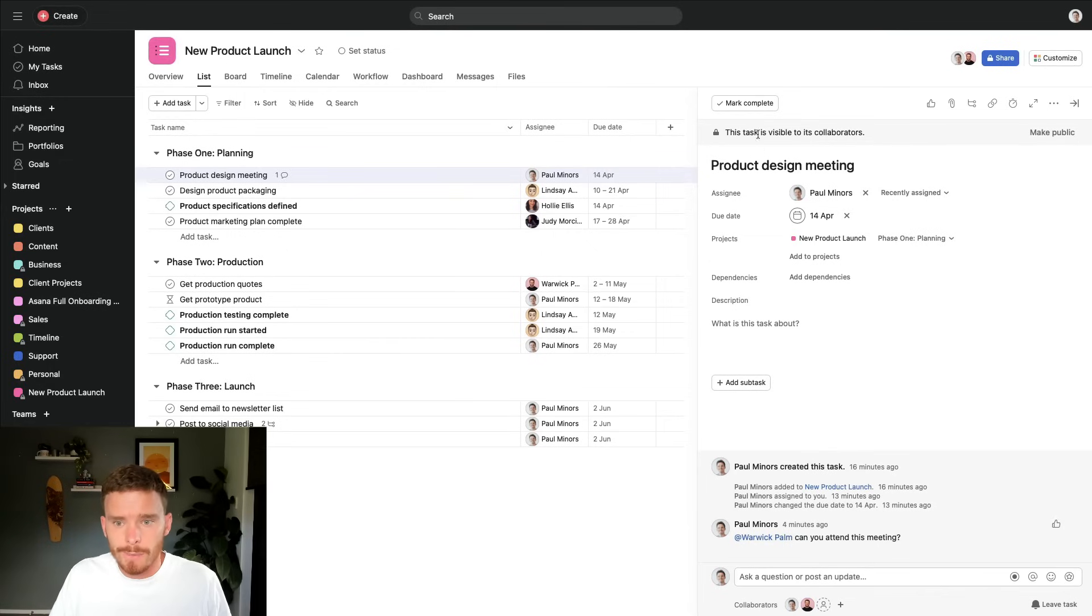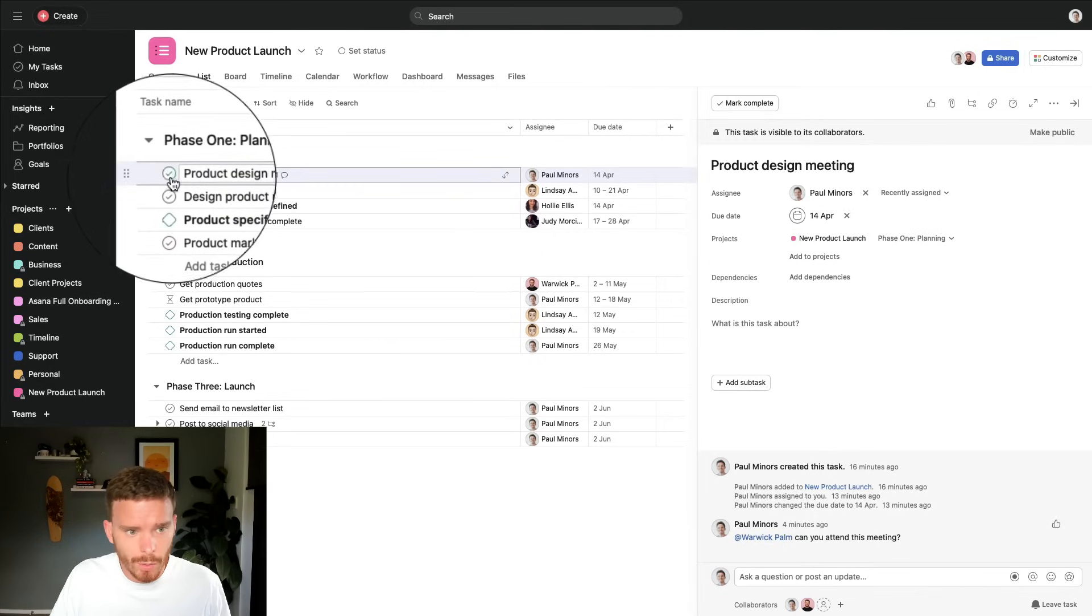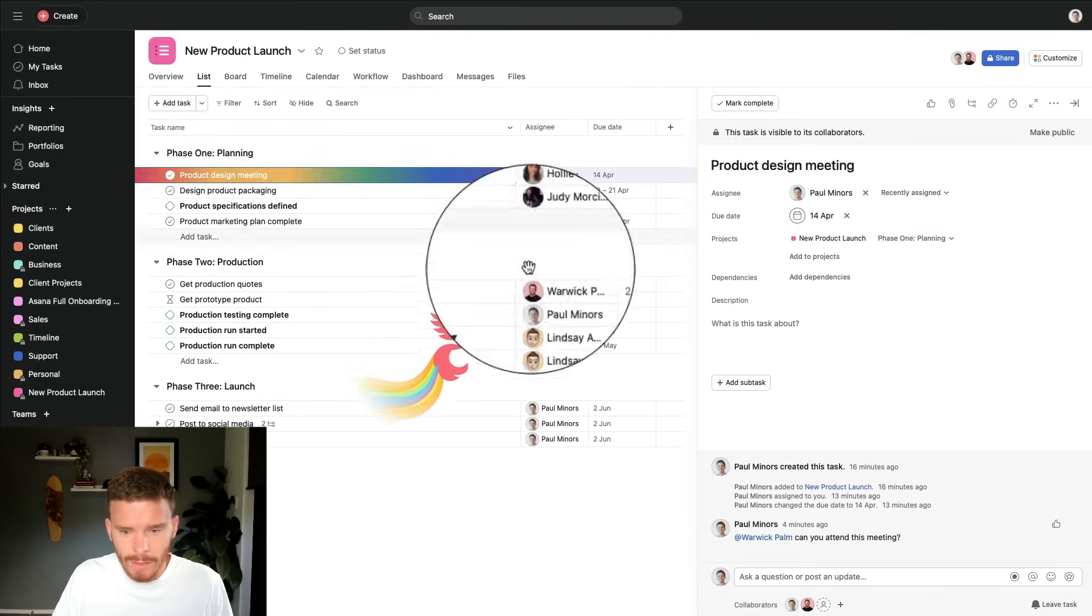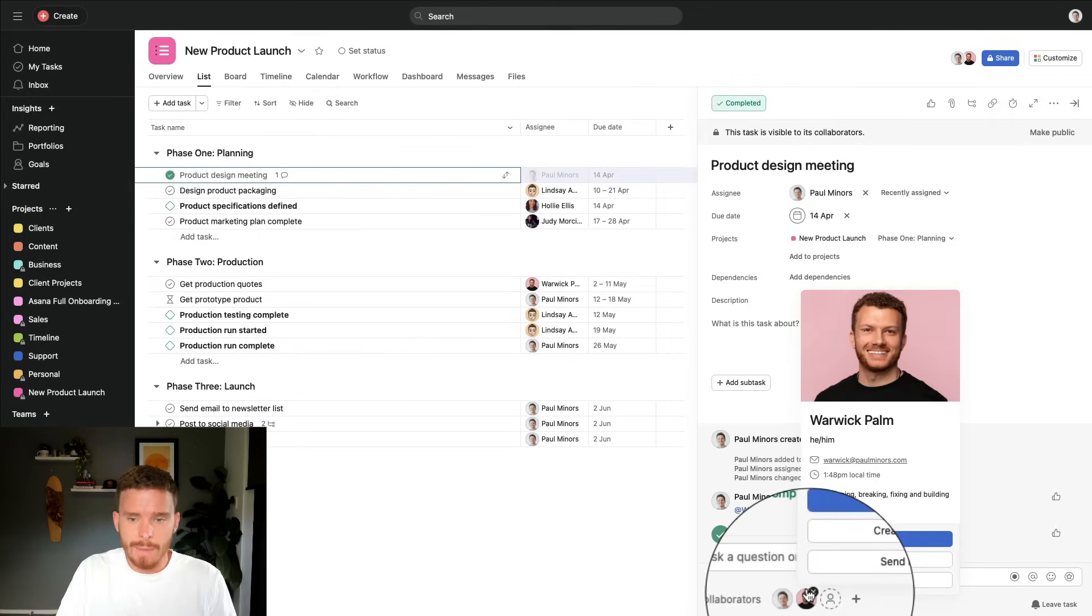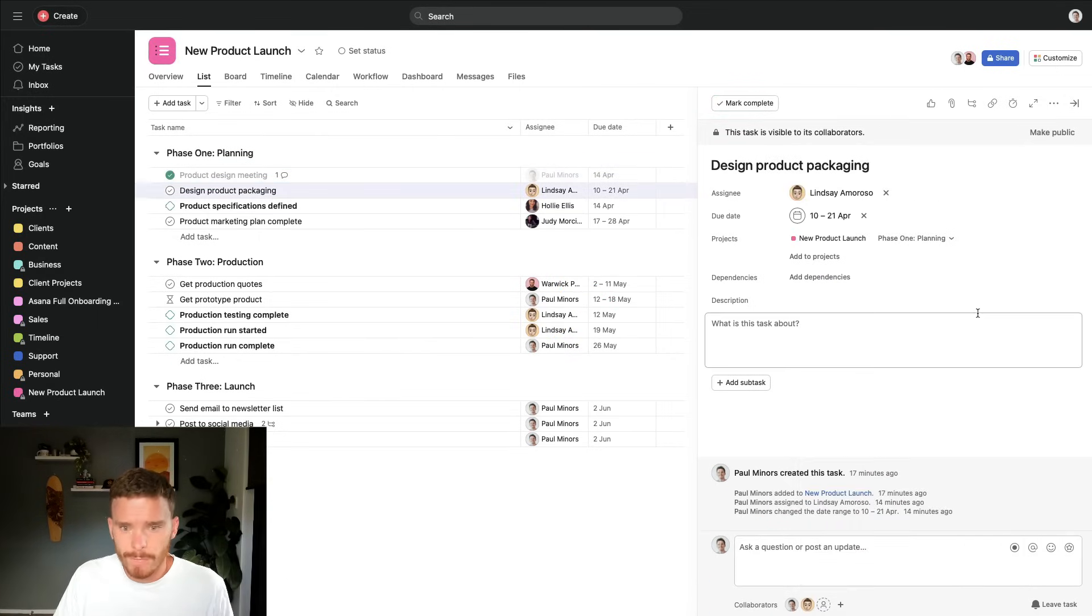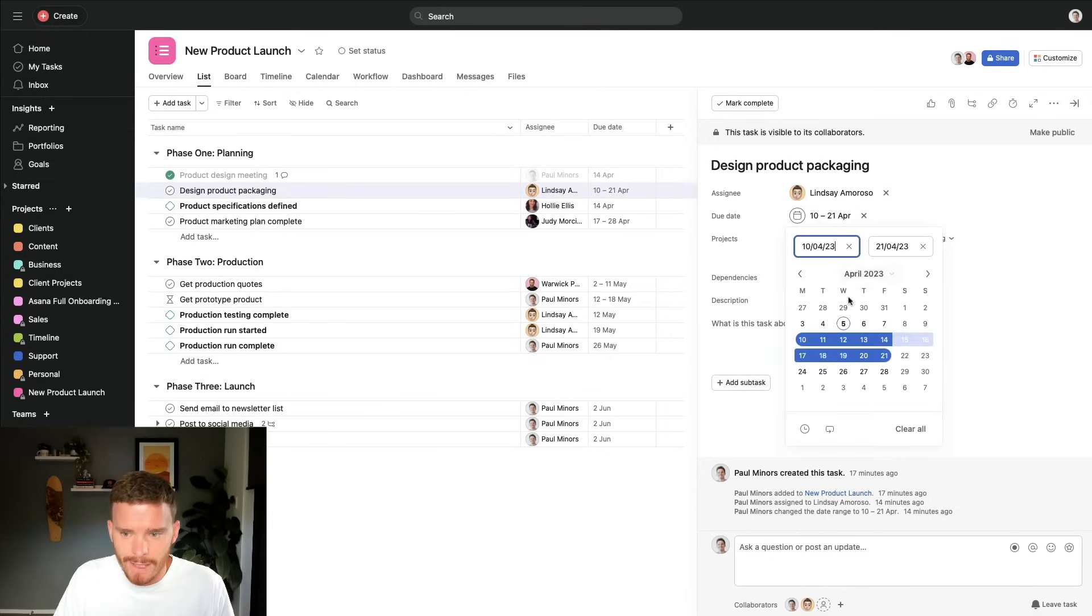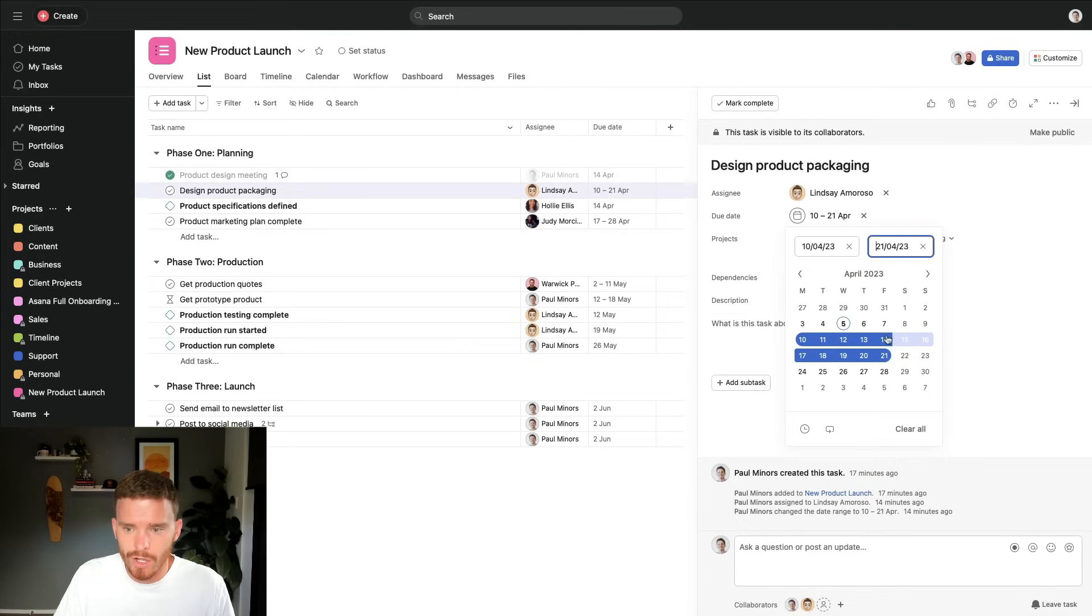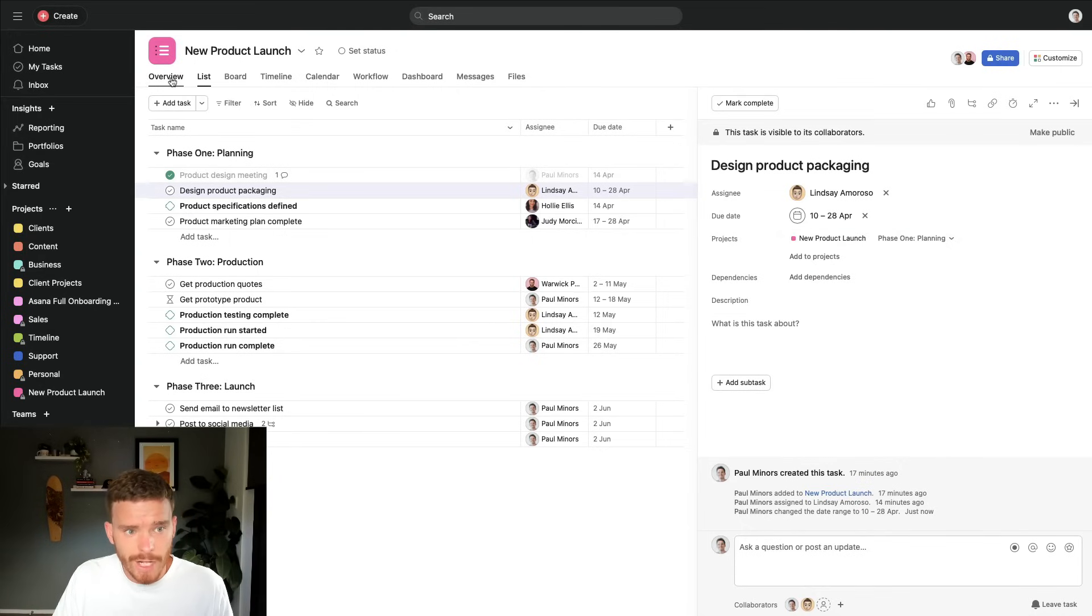Of course, when the work is done, it's important to mark the task as complete, either up here or by ticking this little circle. And that's going to notify the collaborators on the task that that bit of work is now done. And so we clearly know where we're at in the project. It's also important to keep your project plan up to date. So if you feel like you're not going to be able to hit certain deadlines, I recommend updating the due date on tasks so that we have a new target deadline that we can work towards.